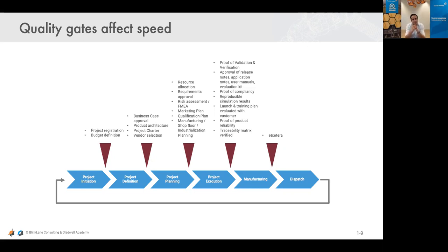via an app on your phone, because if you sell a physical product that might hang inside a house, or that might run on the shop floor of a factory for years after years, you need to think about that up front. So the delivery time, which in lean terms is usually called the lead time, is usually not changed. What is changed, however, is your risk exposure over time, because you check more often in most of your value stream whether you're doing the right thing or not. So I hope that answers the question a little bit, and we'll continue upon it in the rest of the webinar.